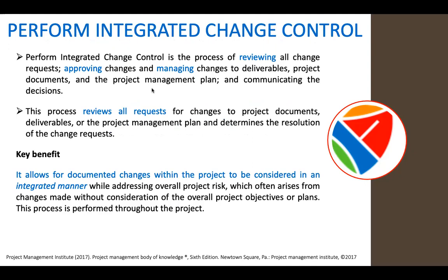This process reviews all requests for changes to project documents, deliverables, and the project management plan, and determines the resolution of the change requests. The key benefit is that it allows for documented changes within the project to be considered in an integrated manner while addressing overall project risk, which often arises from changes made without considering the overall project objectives or plan. This process is performed throughout the project.